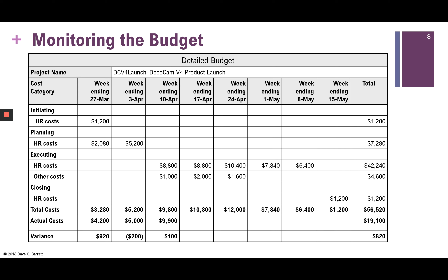If that trend continues across an eight-week project, we could be several thousand dollars over budget. We might look at remaining costs to see if certain activities can be done for less. Without monitoring the budget and comparing actual costs to the plan, we wouldn't know this until the end of the project — so budget monitoring is very important.